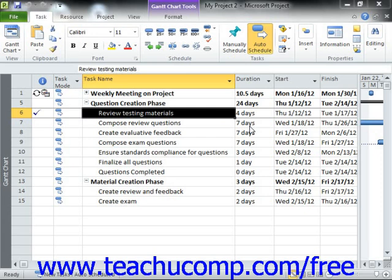You may have fixed costs associated with a task in your project file. A fixed cost is usually a one-time charge that is needed in order to accomplish the task. For example, having to pay a permit fee for a construction project could be an example of a fixed cost. You can easily enter fixed costs into the Costs view of the table in the Gantt Chart view.